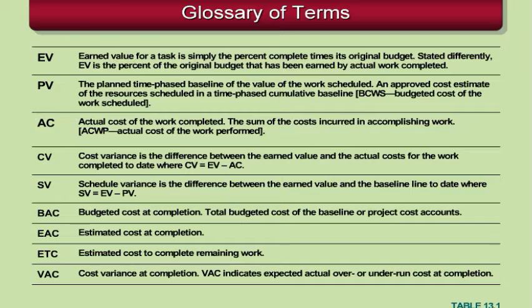And so in this particular case, if we have a 4-day duration activity, that's $400, and we were going to deploy that on a $100 per day basis, the planned value after 2 days would be $200. Now, its earned value would be based on how much of that work's been done. AC is the actual cost of the work complete. I think that's pretty obvious.